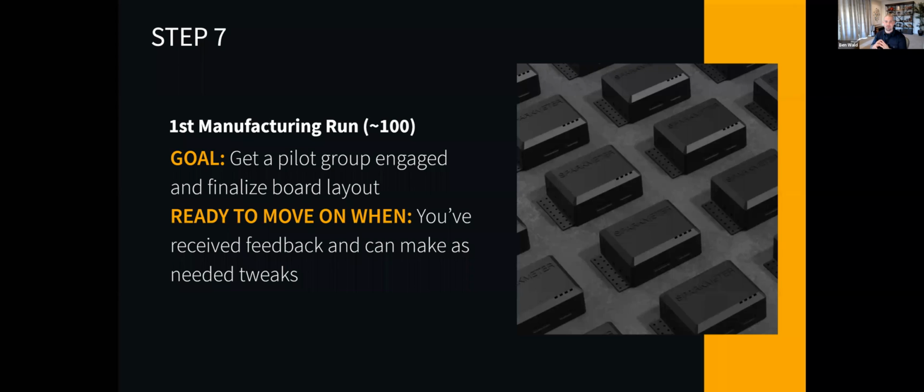So for example, have we figured out and accounted for the time to source all of the raw materials? Have we taken a crack at our final bill of materials? This is going to allow us to do some early checks with our manufacturing partners, making sure that they can handle the types of volumes that we need them to. And are we double and triple checking all the standards and regulations that we're going to need to comply with?